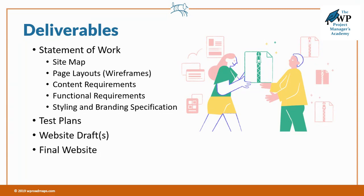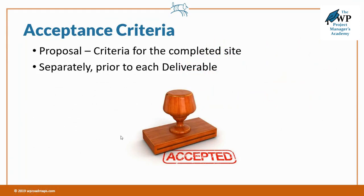Now let's talk about acceptance criteria. You need to agree on acceptance criteria for deliverables upfront. The way you handle it is that you put the acceptance criteria for the completed site in the proposal. For all those other deliverables, if you tried to put the criteria for acceptance in the proposal it's just too much — so we do that separately prior to creating each deliverable. We tell the client, 'Okay, we're getting ready to do wireframes, and here are the criteria for acceptance' — for example, that the layout satisfies the client in terms of where the content should go.